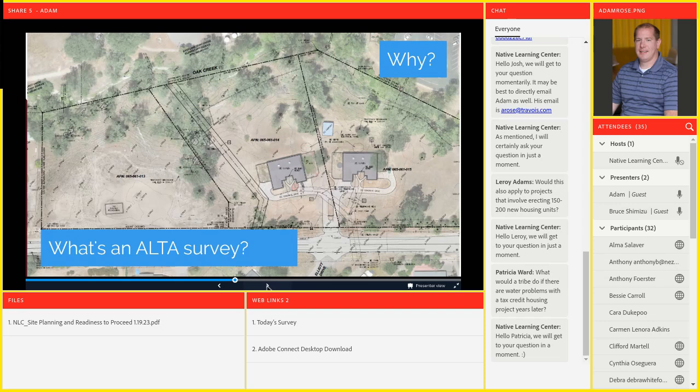Yep. So one of the other resources up front that I certainly think is worth the money in most instances is an ALTA survey. An ALTA survey, Bruce, is sort of the top of the line, the gold standard of survey work. The idea is that you can tell your surveyor up front, I want you to help me identify all of these different things that could be applicable at the property. That could be setbacks, elevations, zoning, wetlands. What it does is start to map out in actual, on-the-ground terms where everything is on the property.